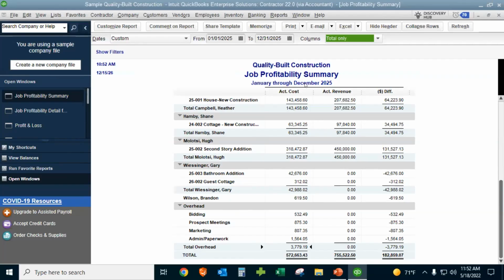It's worth noting because we see that some contractors, if they are completed contract, will code all their job costs to the balance sheet, maybe in a job construction in progress account. Similarly, with their billings, they'll have a customer deposits account. If you are that type of contractor and you run this report, it's not going to show you anything because the default on here is income and expense accounts.